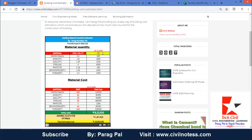For example, we have a 1500 square feet area — just type 1500 and click. It will automatically calculate how much cement bags are required, how much sand in cubic feet is required, how much aggregate in cubic feet is required, how much steel in kg is required, paint required in litres, brickwork in square feet, and tiles. You will get all quantities automatically.